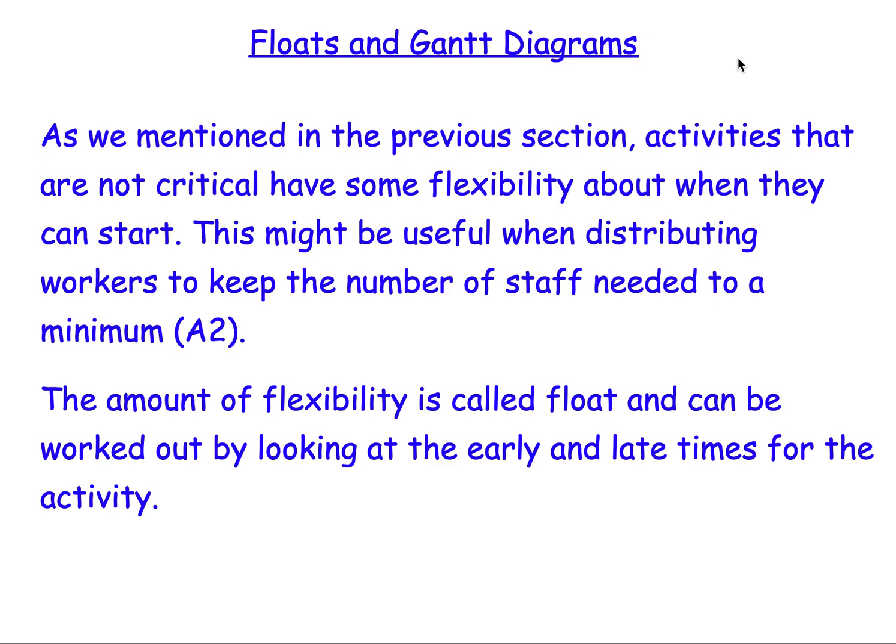So it's useful to know where the slack is, where the floats can be, in order to distribute the workers sensibly to reduce the amount of workers we would need at any one time.